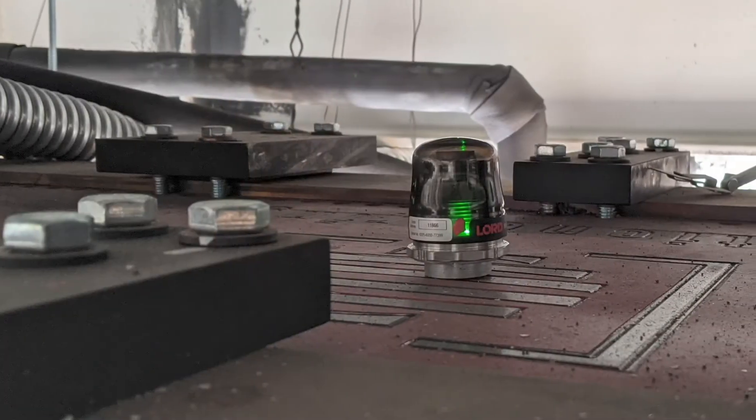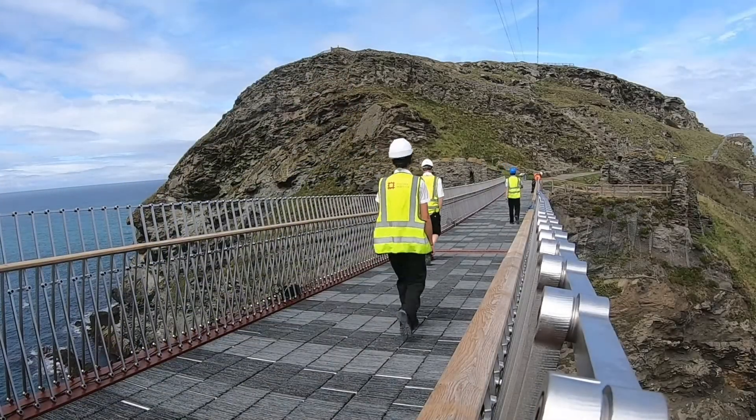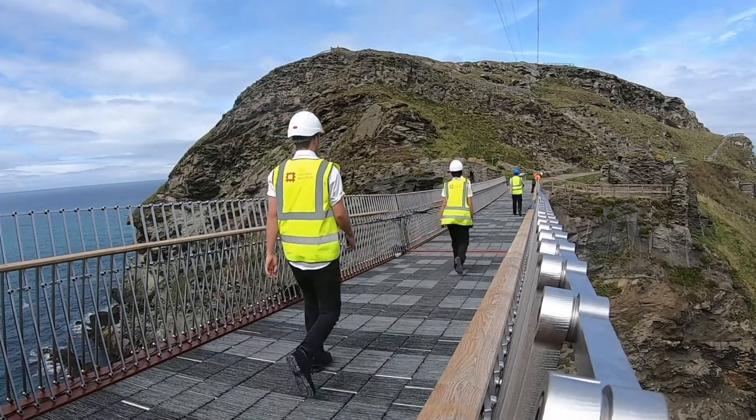When a TMD is installed in a bridge, one of the most important but often overlooked aspect of commissioning that damper is performance verification. Performance verification implies that we do a number of measurements to monitor the motion of the bridge deck and the damper itself to make sure that everything is functioning as intended. When we do these measurements, often we're going to have a group of people or maybe a single person walk or jump across the bridge to excite the bridge and then we can ensure that things are moving and operating as intended.